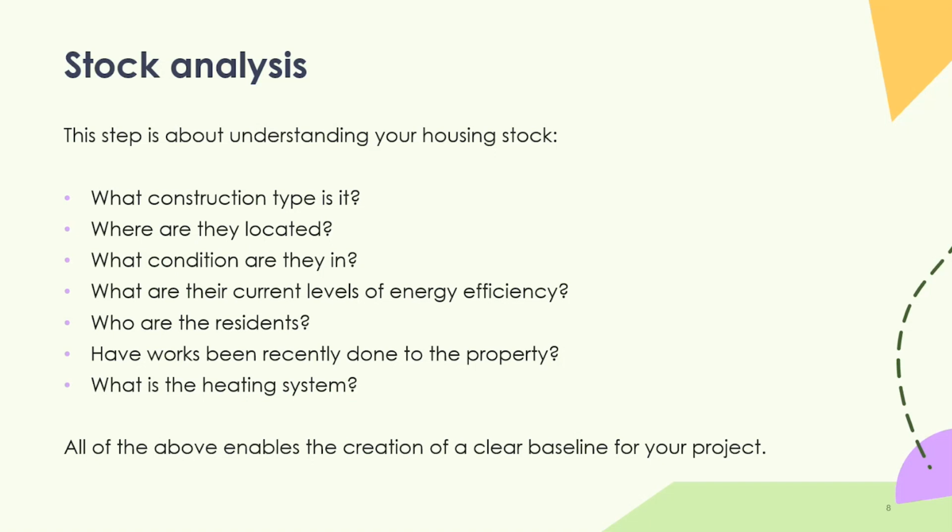The other part to stock analysis is understanding who your residents are. If you have a really good understanding of who your residents are and what potential issues they might be having within those properties, but also getting buy-in early so that you're less likely to have any refusal rates through the delivery, that's a really good position to be in. So knowing who your residents are, so you can have a good targeting strategy and resident engagement strategy to get them onboarded quicker, will help allow for a more effective delivery.